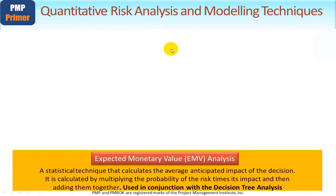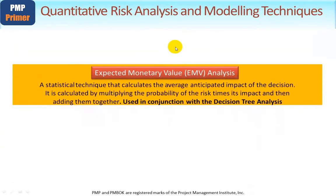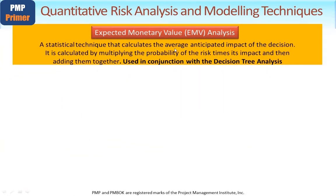Let's look at expected monetary value analysis, known as EMV. It's a statistical technique that calculates the average anticipated impact of a decision. It is calculated by multiplying the probability of the risk times its impact and then adding them together, used in conjunction with decision tree analysis.